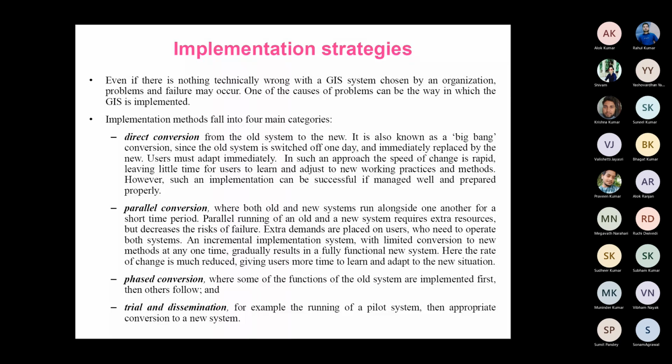Over time, when people become used to the new system, slowly the old system will get removed. And if there is any problem in the new system, if it is not successful, the old system could come back into function. So the advantage is that it is very less risky. People get sufficient time to adapt to the new system. But the problem is